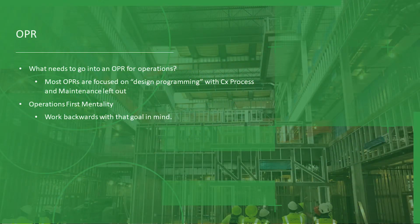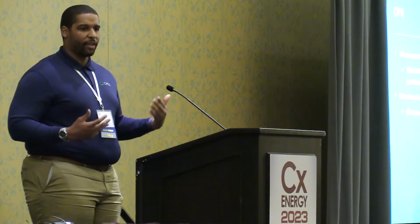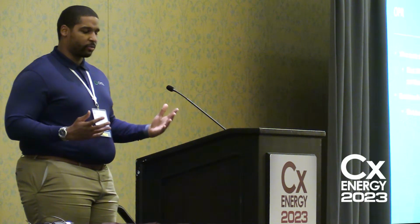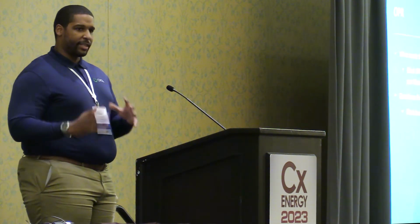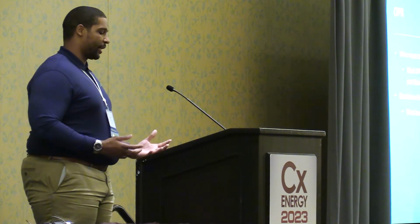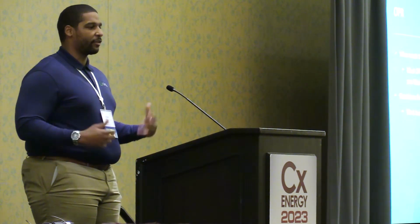So one of the things that's been mentioned today in quite a few sessions is the OPR. What needs to get in an OPR for the operations? Like right now, when you look at OPRs, most of them you go through their design parameters, what set points, but let's focus on having the right people in the room to understand what the operations are. Work backwards with that goal in mind, like focus on how am I going to operate my facility and what do we need to do to make sure that's incorporated into that design. So that's one of the big takebacks from the OPR that I see that is currently lacking.